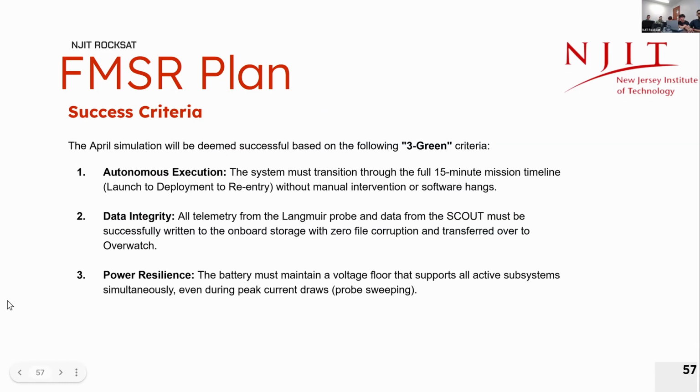Some success criteria: we want completely autonomous execution from start to finish. So a full 15-minute mission timeline from launch deployment to reentry without any manual intervention or software hangs. We also want to make sure we have data integrity. All telemetry from the Langmuir probe and data from Scout must be successfully written on board with zero file corruption and transferred over to Overwatch. As for power resiliency, we want to make sure that the battery will maintain voltage and support all active subsystems simultaneously, even during peak current draws.